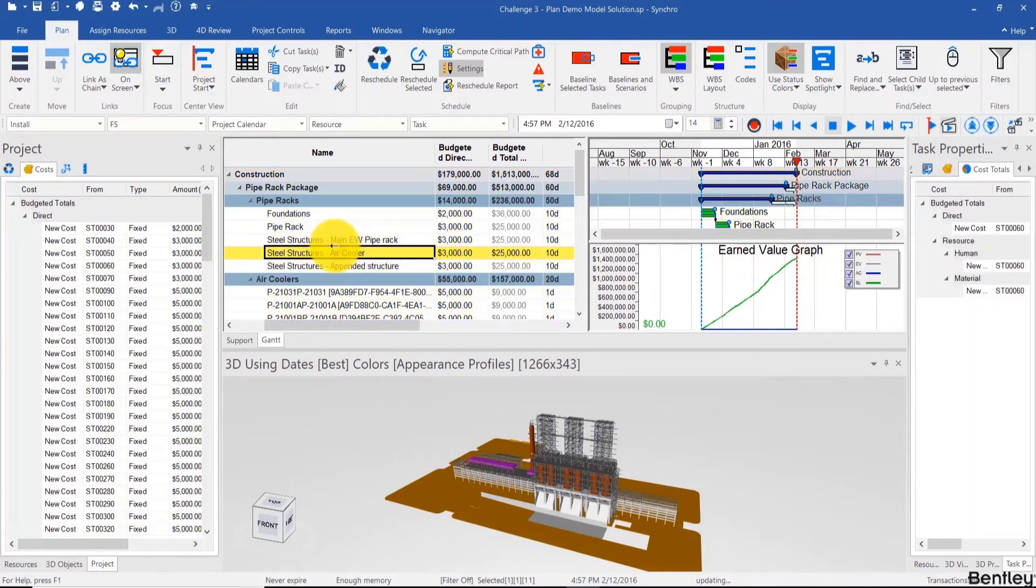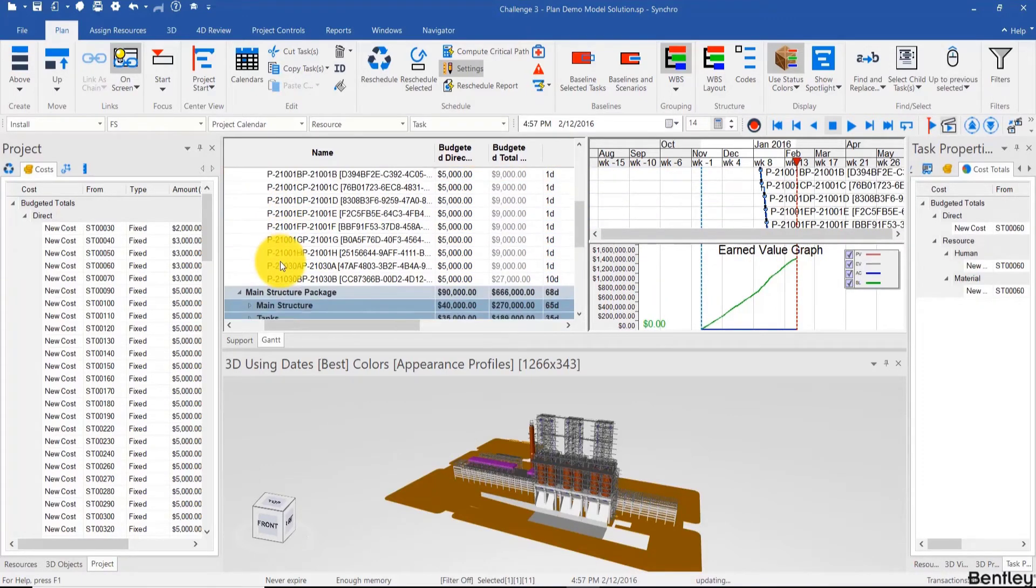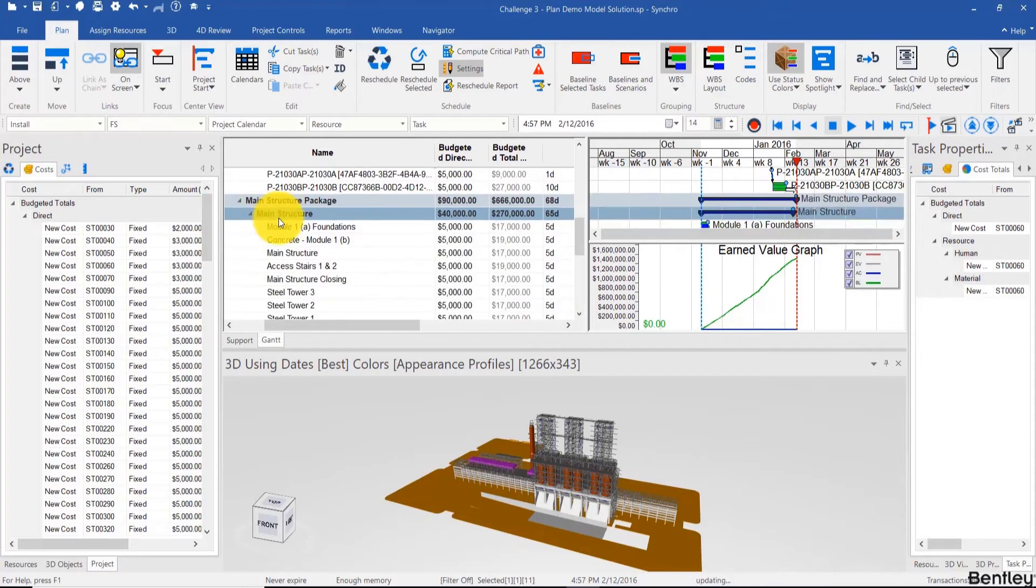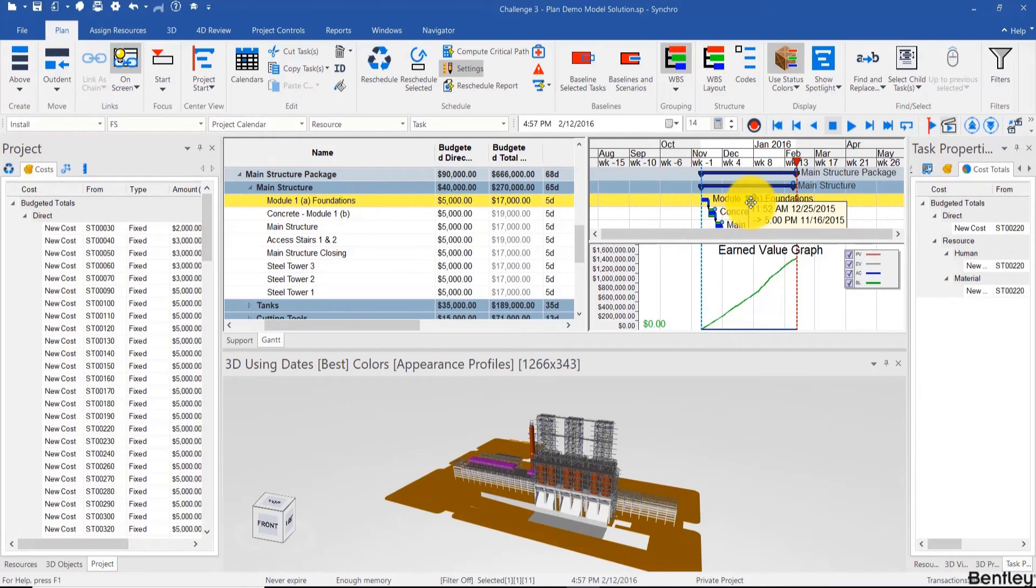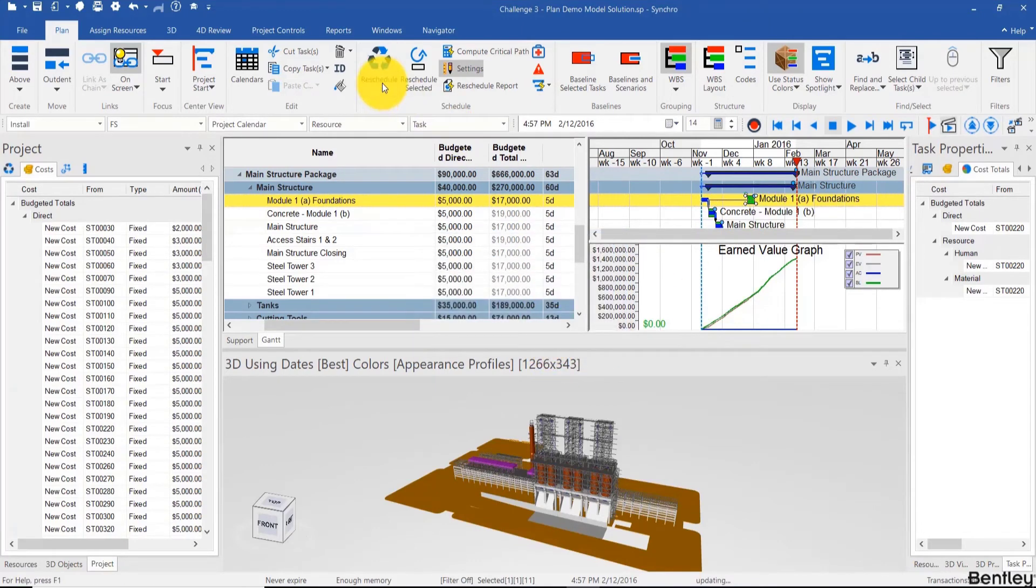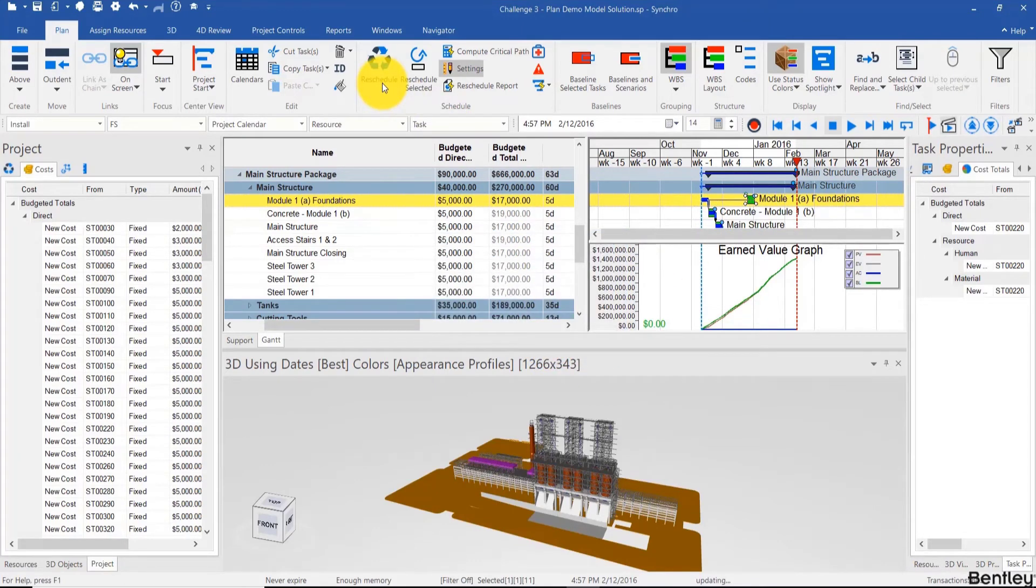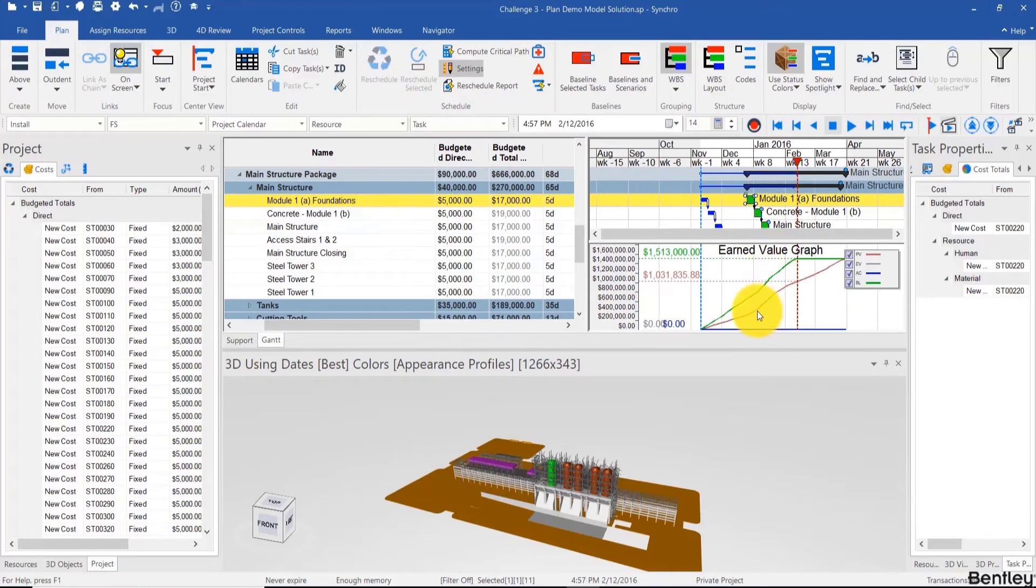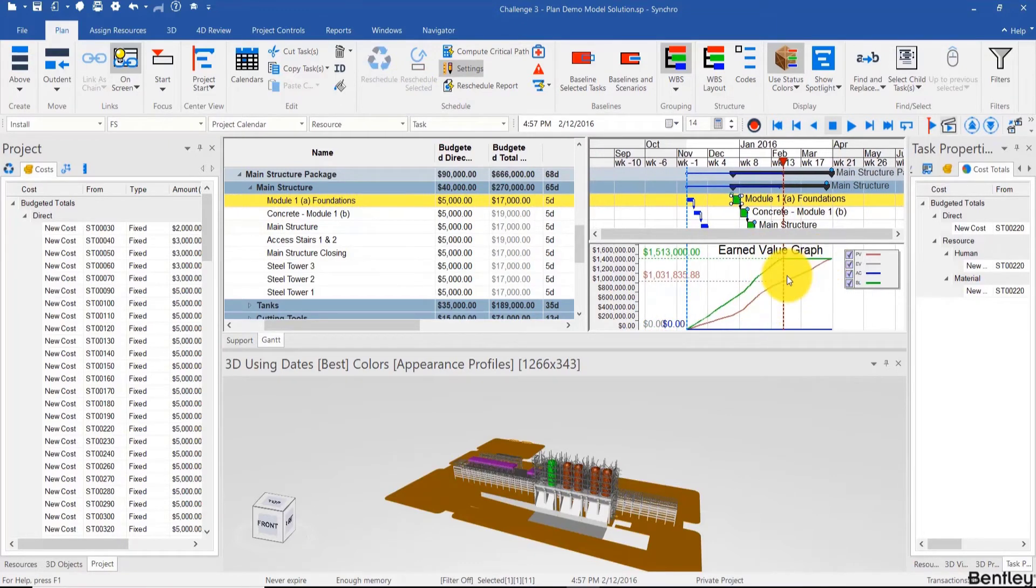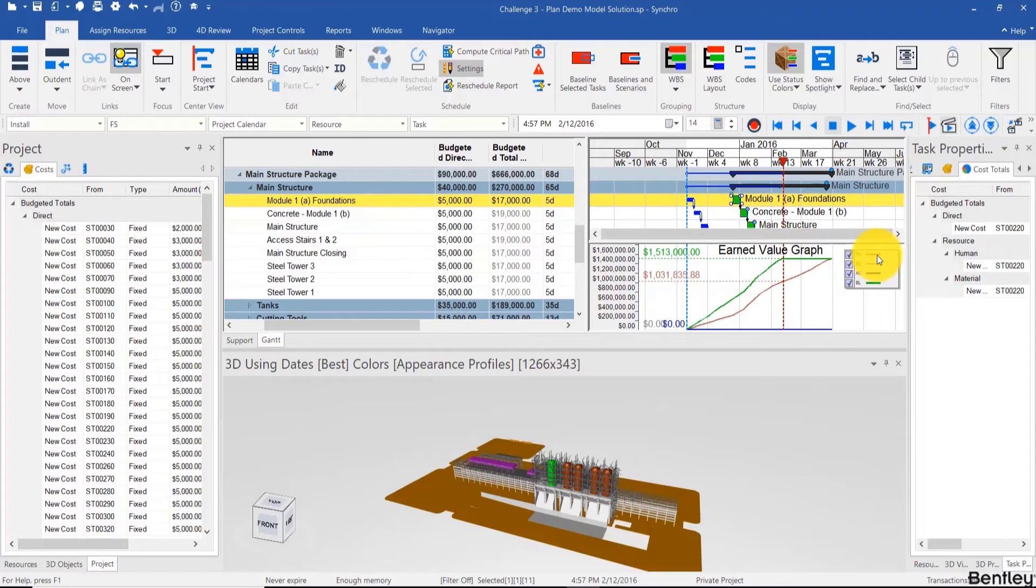And now we can show the baseline. It's exactly overlapping with the red line, which is planned value. And to make them different, for example, I'll assume that we're going to start the main structure a little bit later than what is actually planned. So I'll just drag it and constrain it, and then reschedule. And now we see that the two graphs become different. They end up at the same number because we didn't really affect planned units or durations or any of that cost. We just affected how it was distributed over time. So the baseline is different than the planned value, and the new red line is the new planned value.